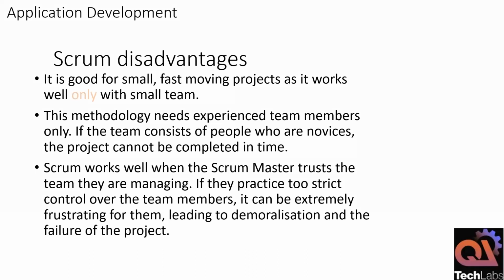If you want to achieve something within 1 week, adding 5 people, 7 people, you will not be able to do that with the help of Agile, because you will have a time box, a minimal team, and the team needs to have very good knowledge of the application you are working on, right? So this works for a smaller group, and you will be able to do a lot of iterations with chunks. Typically, if you are involved in architectural migration, a microservices sort of application, Scrum will be very, very useful.